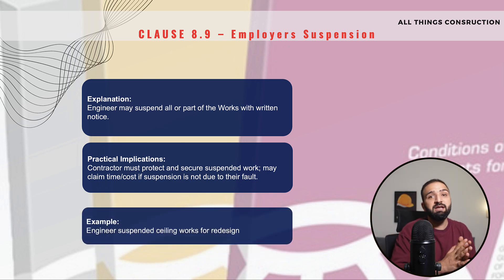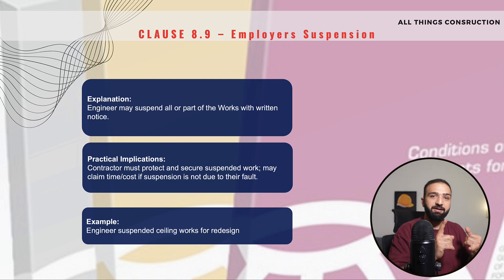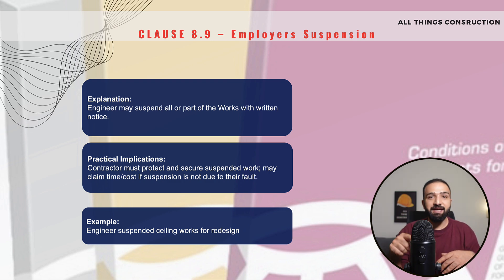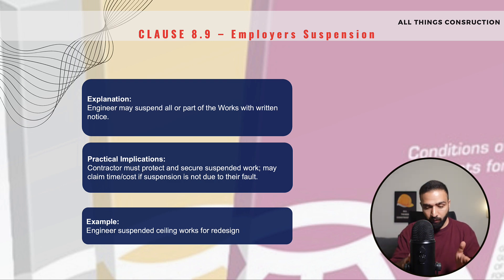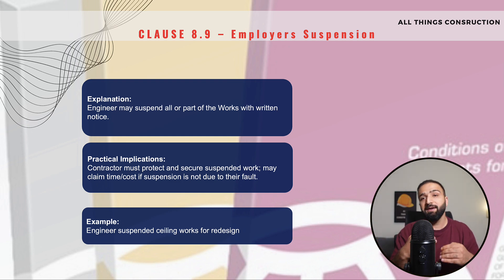For example, we are constructing a ceiling and the engineer or employer suddenly decides that this is not the type of ceiling they want, so they want to change the entire design. In this case, the engineer will instruct us to hold and suspend these works until the new design is issued, and we can carry on with the remaining works.